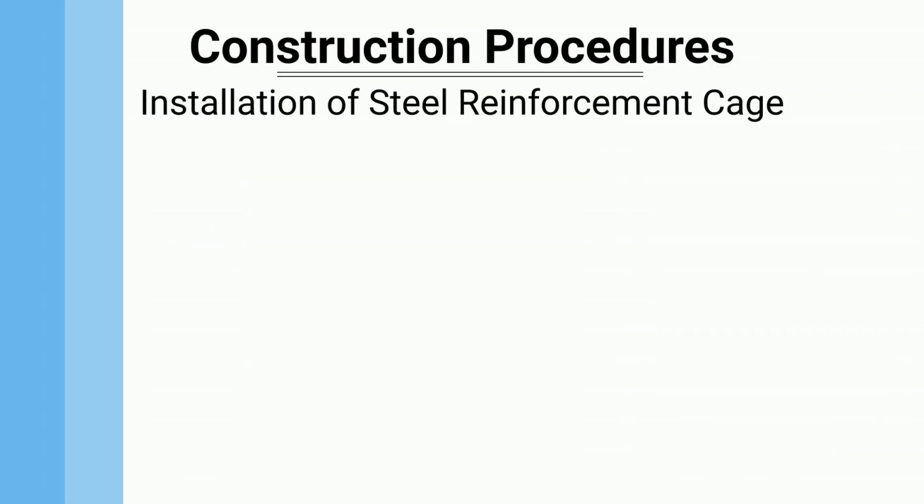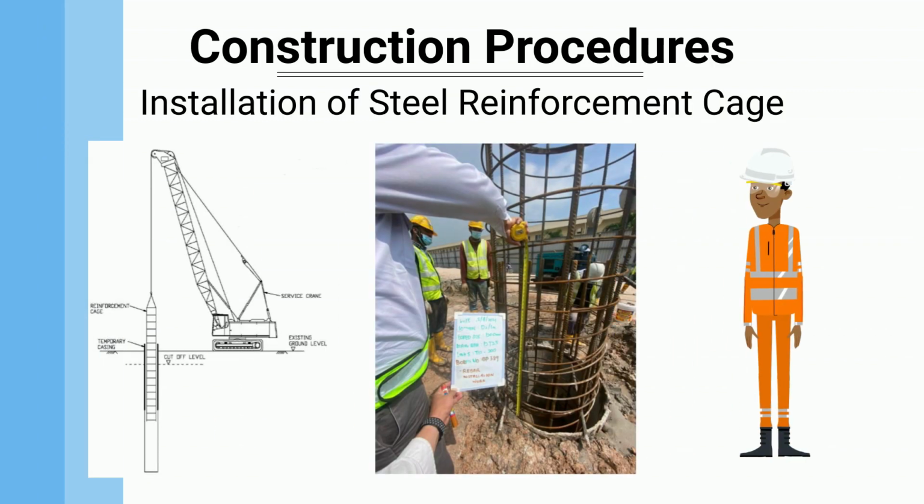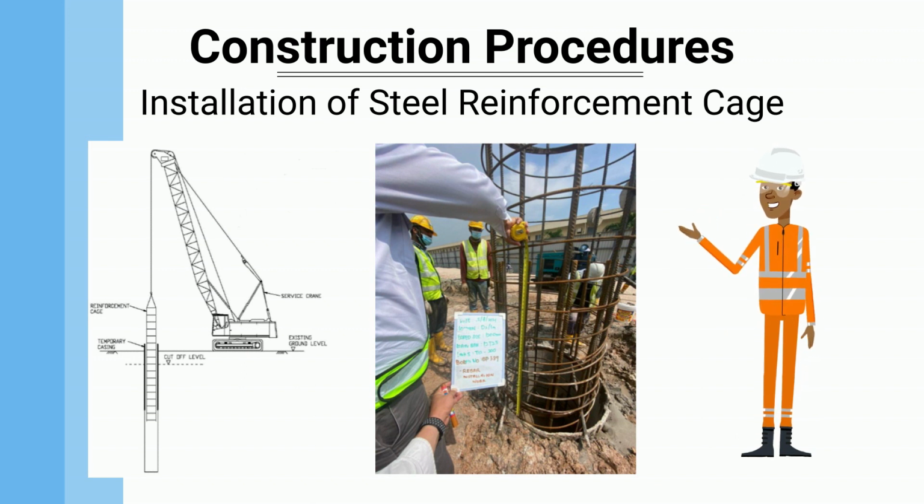Installation of steel reinforcement cage. Depth to be lowered is determined by the difference of existing ground level, and cutoff level of the pile.